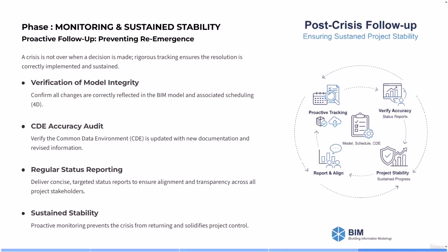Number one, identify the cause of the problem. In this case, of course, the lack of material supply. Number two, assess its impact on cost, schedule, and design. Number three, create proposed scenarios using the model. Number four, present them to the client and obtain approval. Number five, update models and project plans. Number six, control, execute, and approve decisions in the project. This way, decisions are made quickly, logically, and with minimal risk.